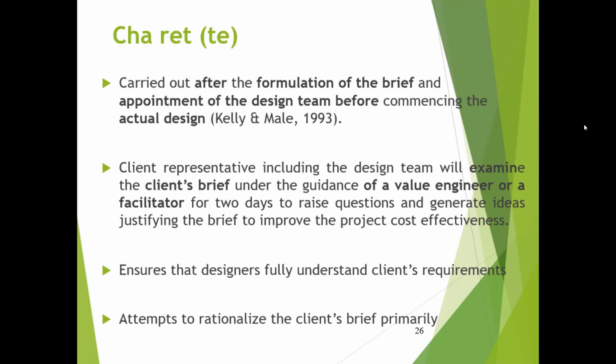They prevent value achievement in a project. So when a variation happens because of a lack of understanding about the client brief, the variation anyway results in additional cost and time.